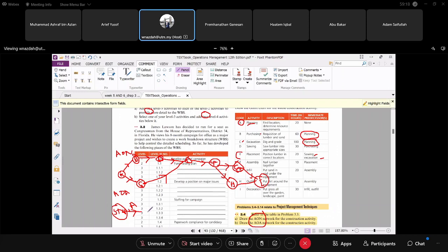After you are confident that you can start B after you have completed A, then you may draw a node at the end of A to show the end of A. So the beginning after you end A is B. Right? Understand? Notice I have not put the node yet. I have not closed it yet.